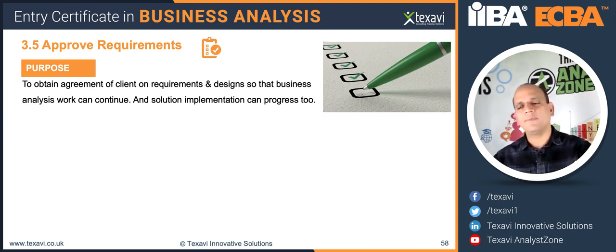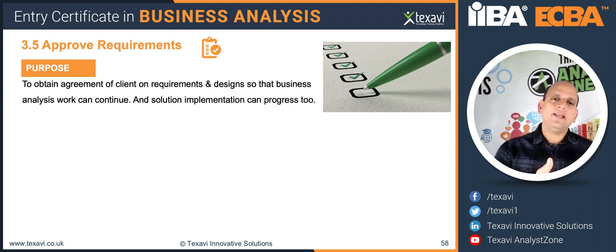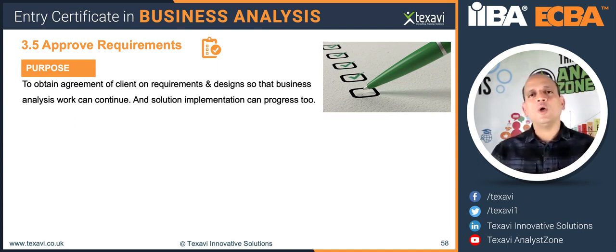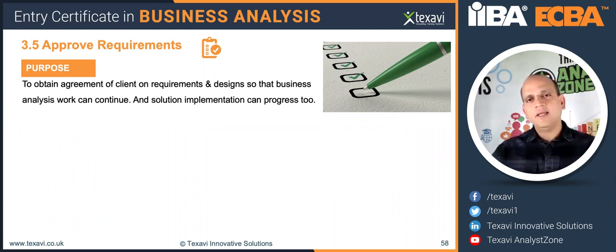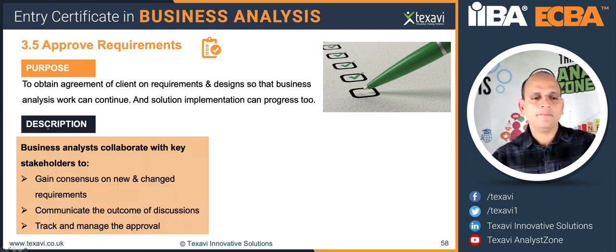Then following from there, you'll get more and more requirements, and once you get the requirements all in one place and well maintained, then that gives the go ahead for the architecture. Once the architecture is in place, the design will go on. Once the design is done, then you can follow with the development, and once the development is done, it gets pushed into the testing environment. The testers would have a go at the build, and then they come up with the testing results, and everything else is in place. Then it goes into production. So everything is actually kind of interlinked that way.